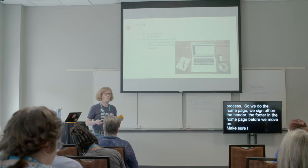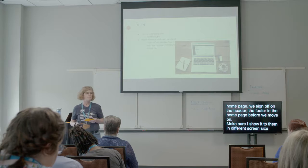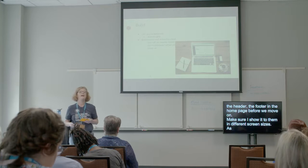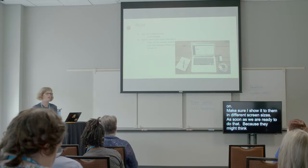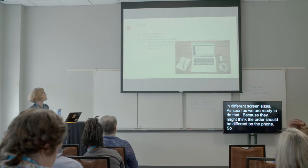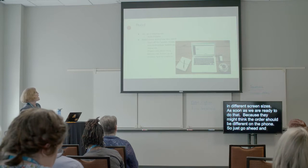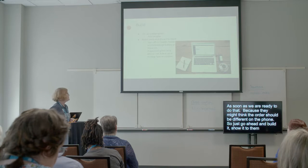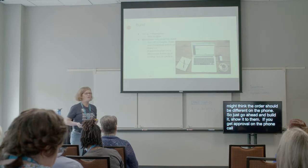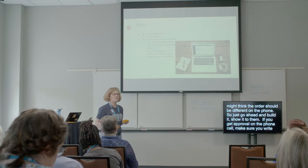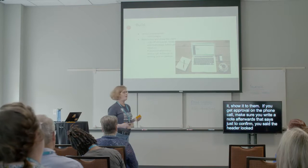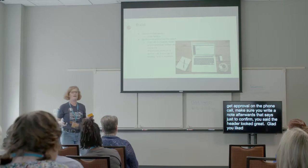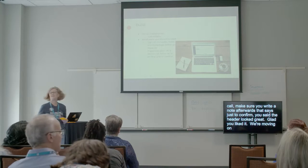We build some and we show the client. Some people start building and they don't want to show anything and they want to finish it. Clients understand this is a process. So we do the homepage. We get them to sign off on the header, the footer, and the homepage before we move on. Make sure I show it to them in different screen sizes as soon as we are ready to do that. Because they might think the order should be different on the phone. So just go ahead and build it some, show it to them.